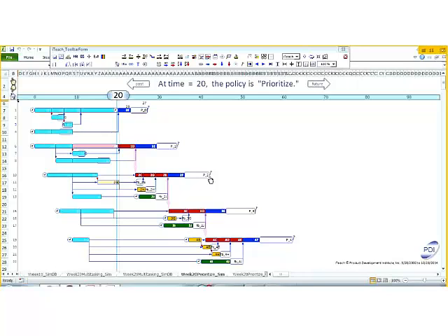And the useful way of making the whole system go faster isn't to continue to increase the work in process. We want to freeze the work in process and have them either help get projects underway to continue or help get full kits ready for the remaining work. Good comment. Any other questions or comments?